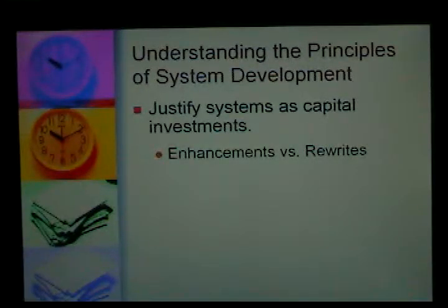And we must not forget the dollars. Without the funding, most of these projects cannot exist. So we must justify the system as a capital investment. Within a lot of organizations, investments are divided between enhancements and rewrites. Enhancements are sometimes an expense to the company, whereas rewrites can be looked at as capitalized projects or capital investments.